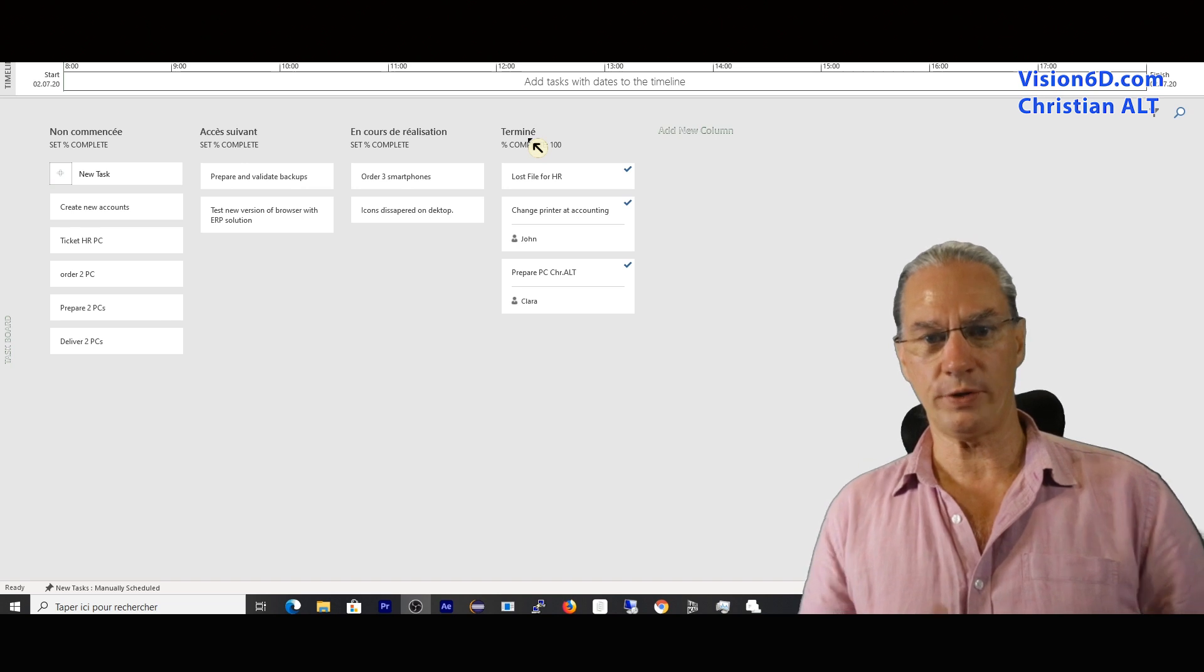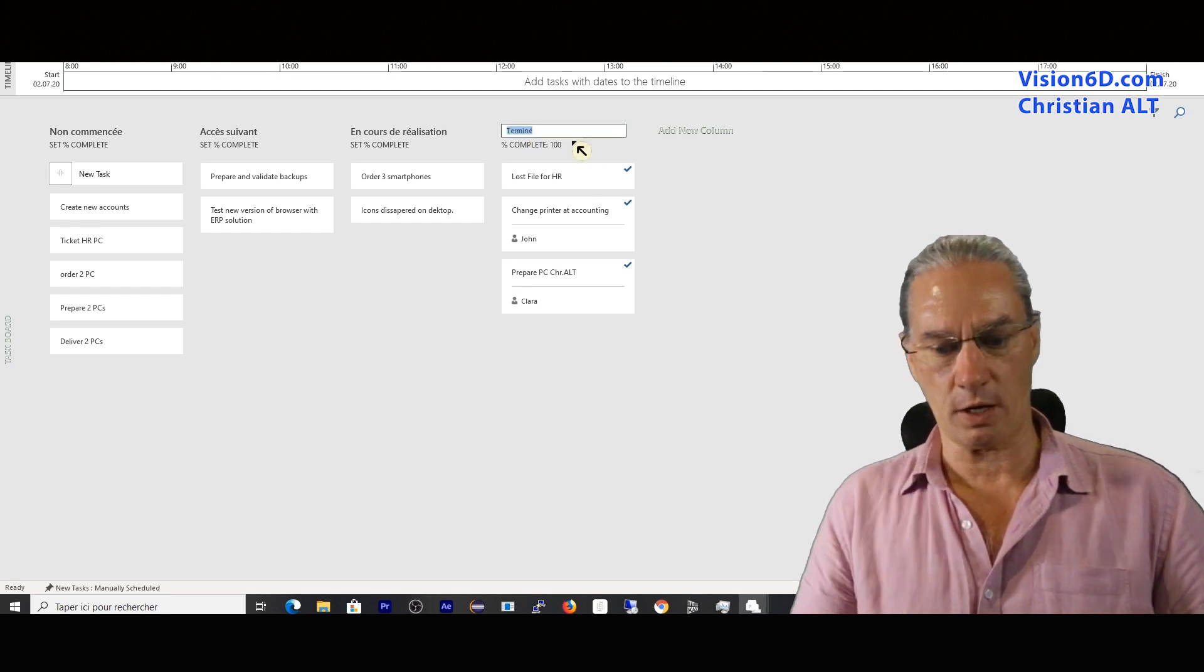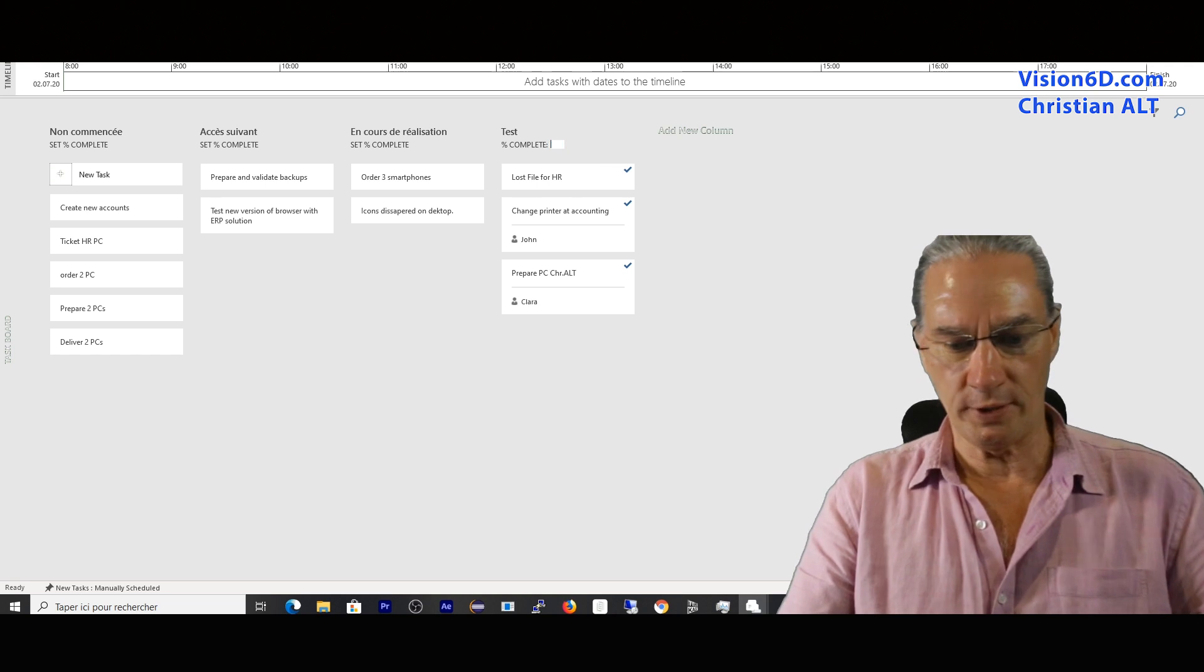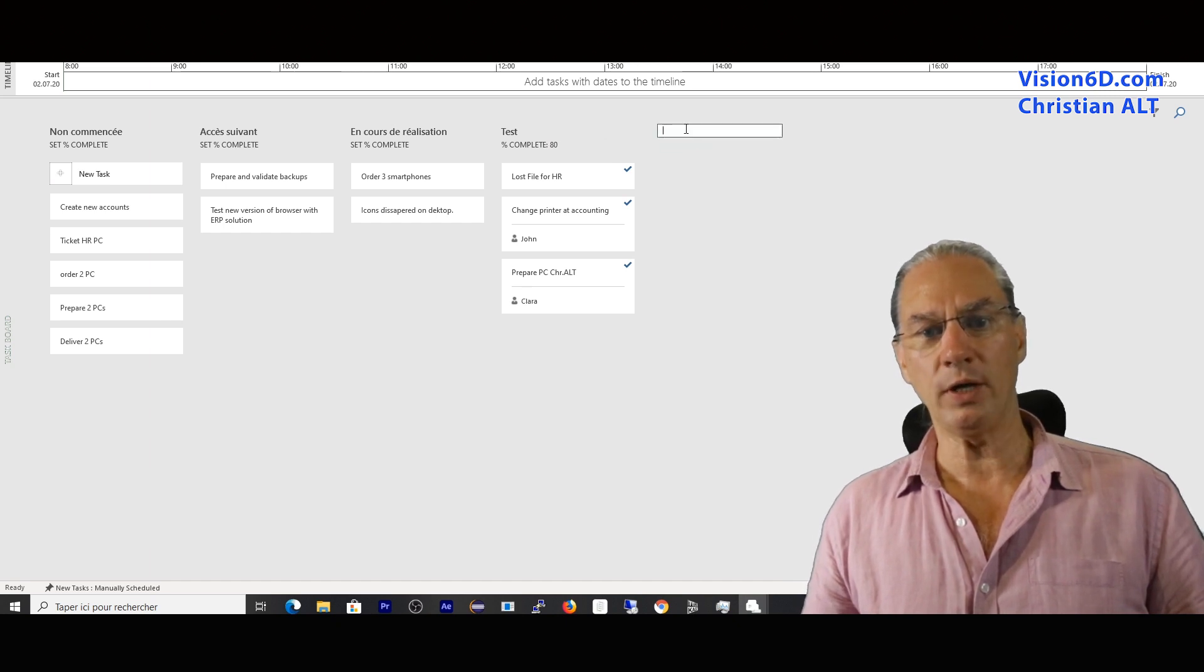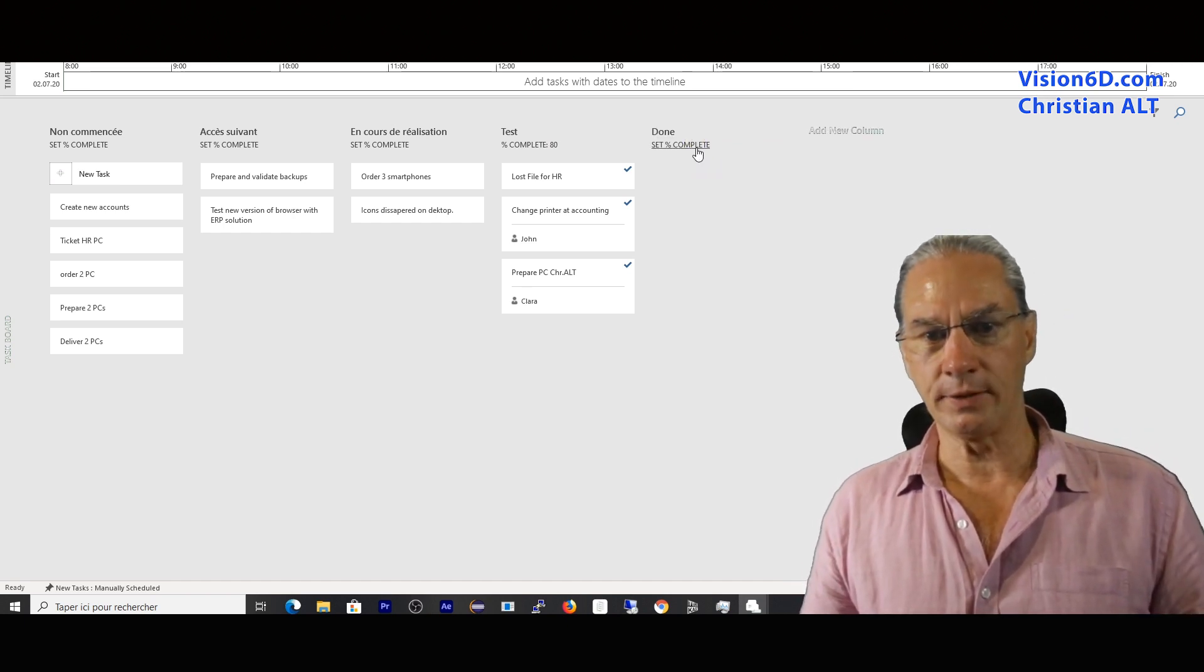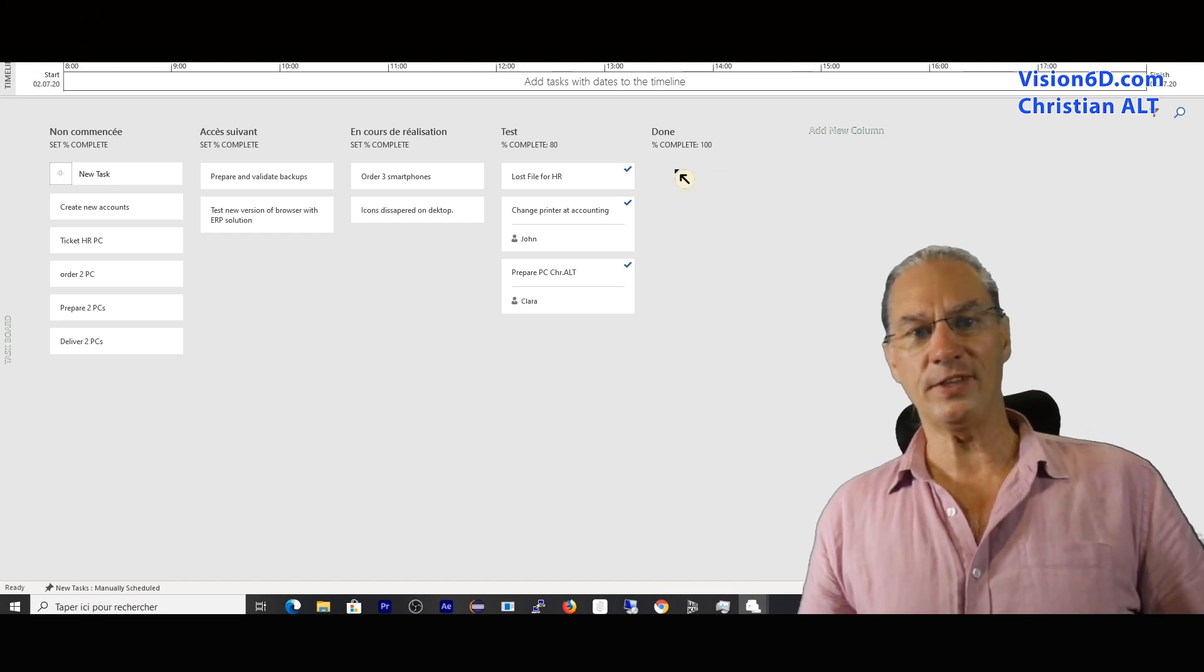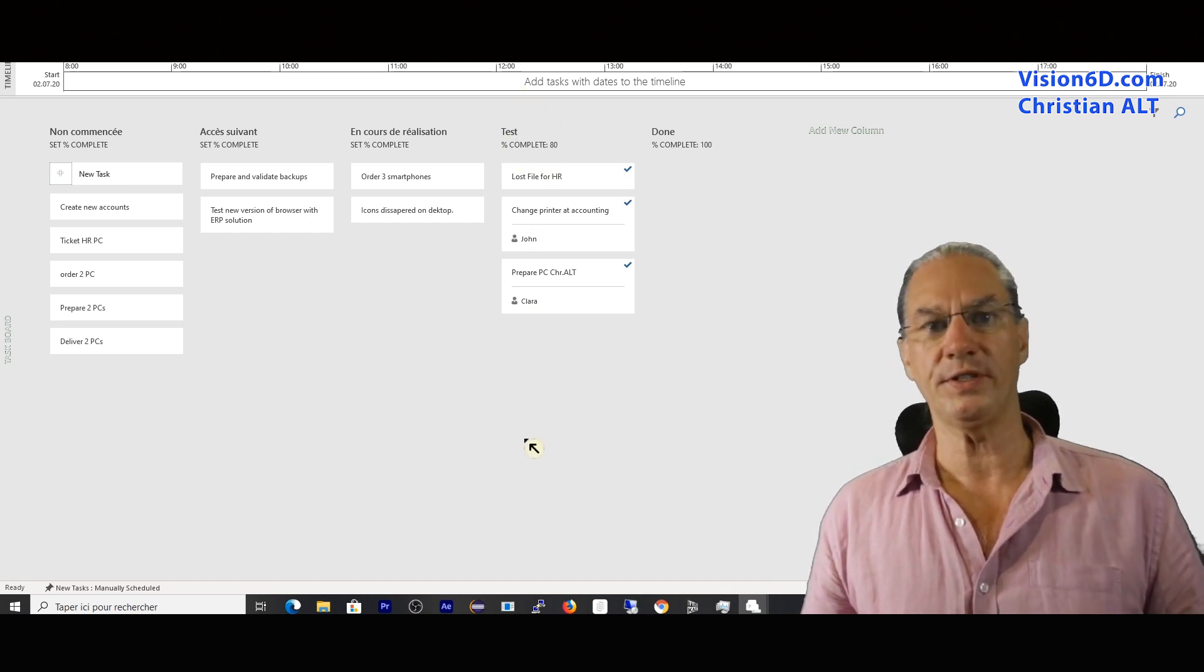I want to change this because I would like the support group to add some tests and to make sure that they go through the test before the task is done. For this, I will come here and rename this column to test. And test, I will say it's about 20% of the work. So I will say that when they are at that point, they've done 80% of the work. And I will add a column. And that one will be the column done. And the column done is set percent complete, and I will set it to 100%. I've done those modifications like that. The flow has been with an added step with the column here test.